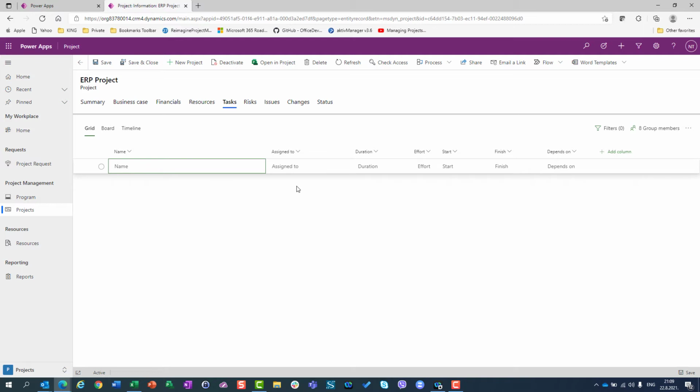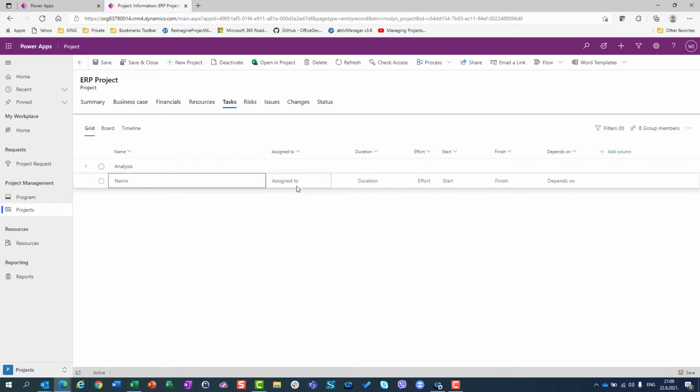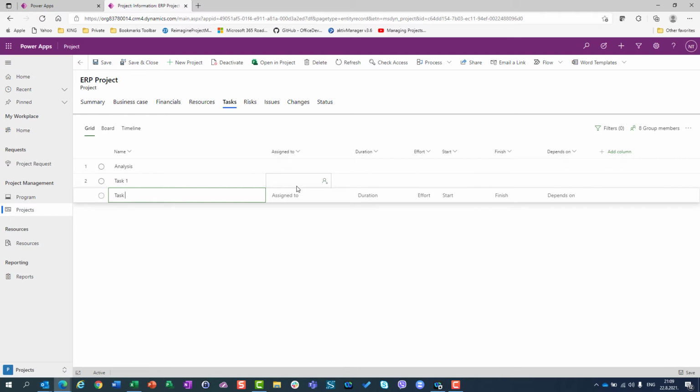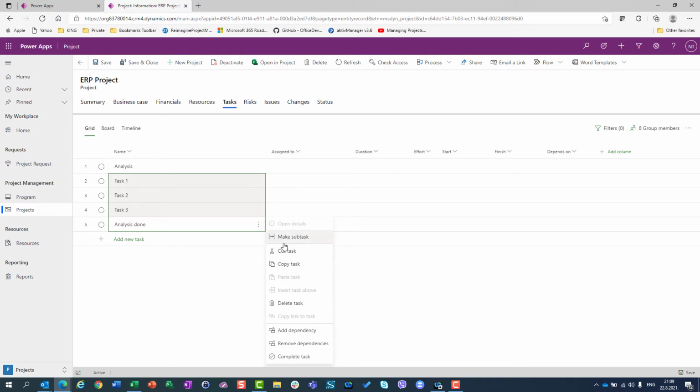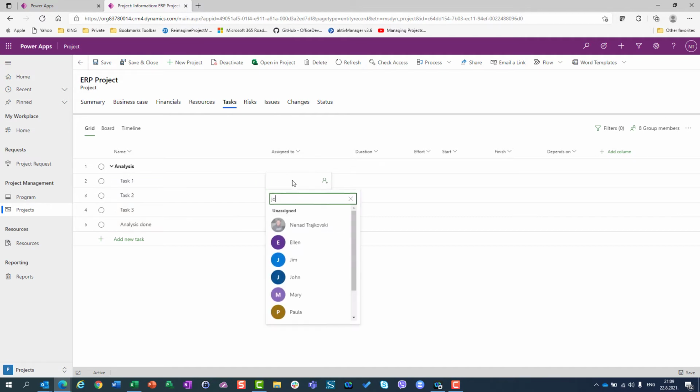Now it is time to say analysis, and I will say task 1, task 2, task 3, analysis done. I will right-click and make subtasks. This is the summary task. To whom is this task assigned? To John. Okay. To whom is the start? Mary.